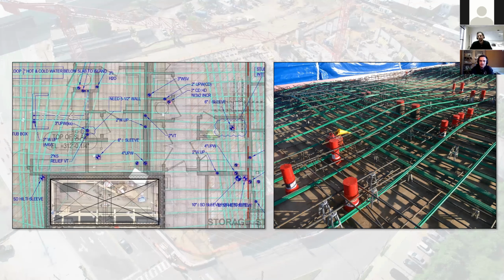Yeah, with tolerance, you pretty much just look for known elements and then you scale it to match those items. Typically, most sleeves will line up and then you'll find an outlier. I've seen some workflows with terrestrial scanners doing back checking, but those are tens of thousands of dollars and it's a whole process. And this is just a $1,000-something drone. Get up there, get a photo, save yourself schedule and rework time.